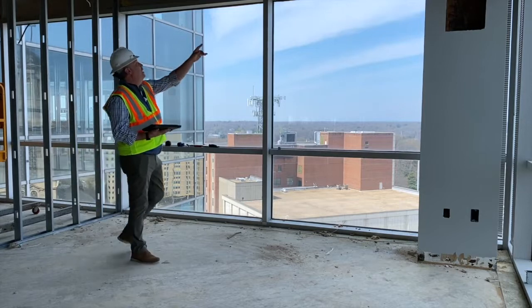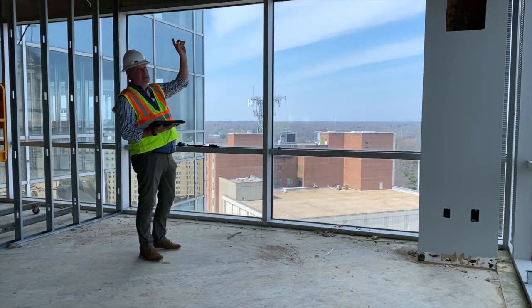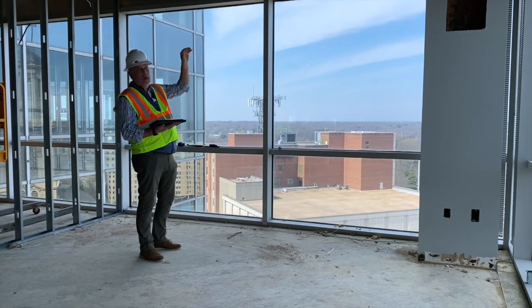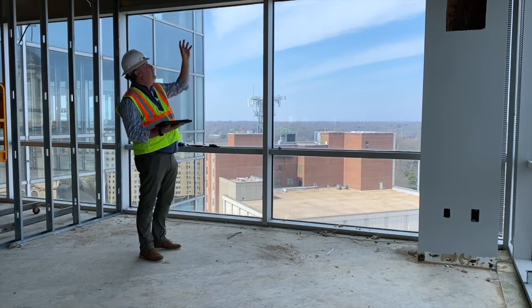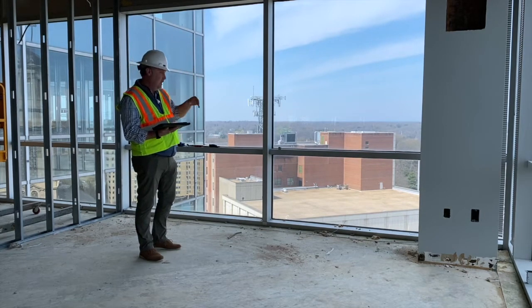Part of what we do in a design build project is verify infrastructure as construction is moving along. We're going to install a projection screen here. It's a very tight area because of the ductwork, so we've ordered a low profile screen and we're working in conjunction with the HVAC folks to make sure that everything fits properly above the ceiling.